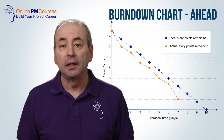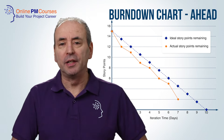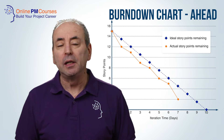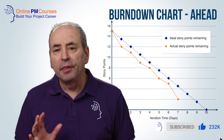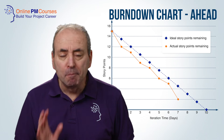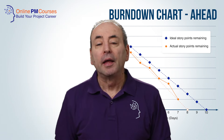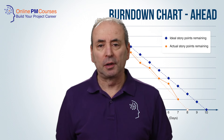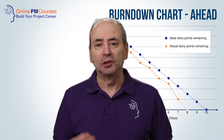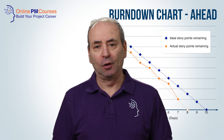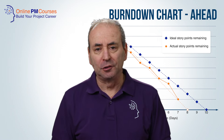If, on the other hand, actual progress lies below the ideal line, then we know that the team is ahead of schedule. This means that it may finish its backlog before the end of the cycle, and they may choose to go to the product owner to draw down another user story into the current backlog, so that they don't waste time during the cycle.